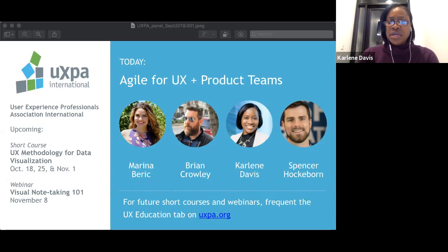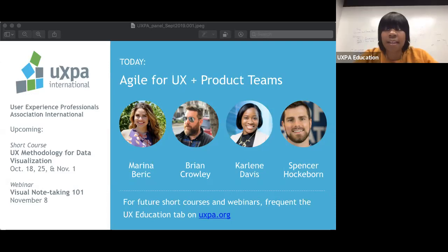And to answer a question that was posted, that allows us to stay at least one to two sprints ahead of the delivery team, which ultimately allows us to pivot, learn, and provide handoff to the developers so that they have requirements and designs and a good understanding of what they're working on. So there's less of an opportunity for work to change while the developers are actively working on those user stories.